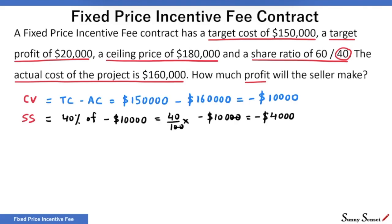Next, let's look at the actual price, which is actual cost plus target profit. We could have stopped here if the seller had managed to keep the actual cost exactly equal to the target cost. But in this example, we have a cost variance — it is not zero. We have to adjust the target profit by the seller's share of risk for the cost variation.